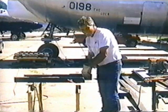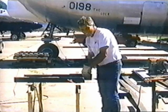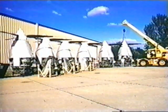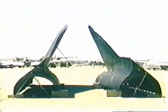But building the new facility was only part of the monumental effort that was needed to bring the new SAC Museum from a dream to reality. Preparing 33 aircraft and 6 missiles for the 36-mile move through the rolling hills of Nebraska, and then actually moving them, was something that had never been tried before. It would represent one of the largest aircraft moves in history.